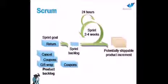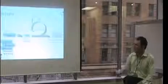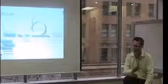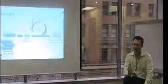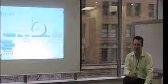Now, the best piece of advice I can give you, which I give virtually everybody nowadays, is that product backlog. It should be made public. It should be on your intranet. It should be somewhere where everybody can see. So that if somebody says, well, what was delivered is not what I wanted, the onus is on them to have actually looked at the product backlog and understood where their features fell in the priority list.